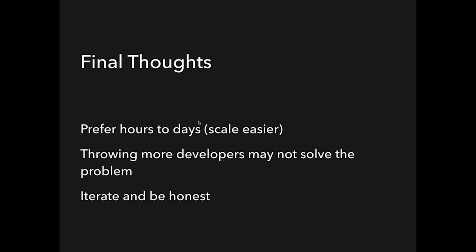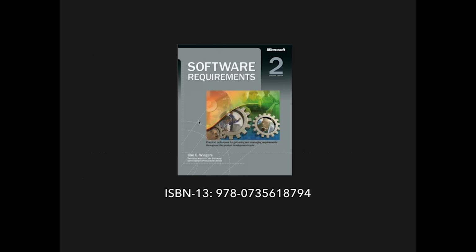So for instance, if we're working on this food bar REST service and we give it a valid phone number and it's kicking back all sorts of crazy errors, you put a support ticket in right there, go back to the product owner and say, hey, I gave this number and it said it was invalid, but now it's not. I submitted a support ticket and we're not going to get this done on time. That gives the product owners and managers time to readjust their priorities.